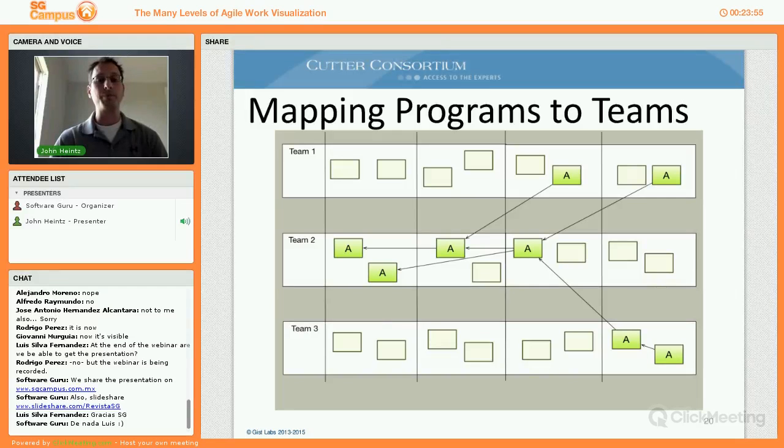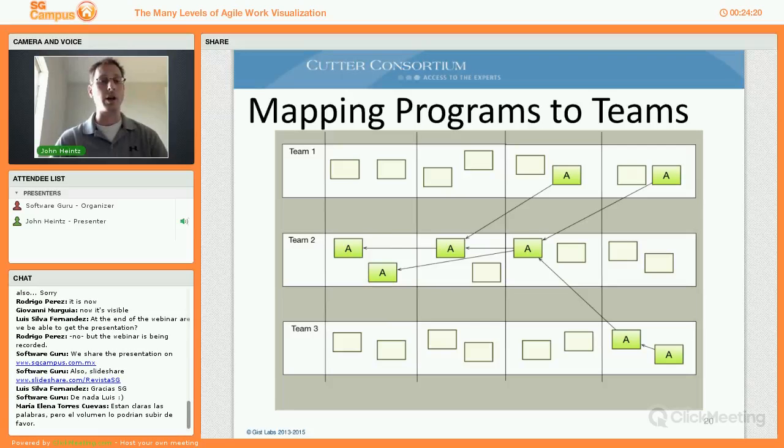It also helps us to prioritize the work that we're doing so that we don't step into that situation where the work is then affected across multiple teams. In this case, what that would mean primarily is that team 2's priorities of working on these cards from the A project are higher priority than the other cards in team 2's backlog because of the consequences across multiple teams.